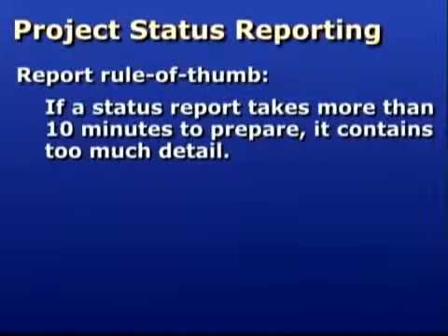Remember, the main purpose of the report is to relate the status of project tasks. Reports do not require a detailed list of all the items each team member worked on. No matter what the size of the project, my rule of thumb is if a status report takes more than 10 minutes to put together, it contains too much detail. Reports can vary from a simple 1-paragraph email to a spreadsheet populated with information from multiple team members. The project manager must clearly communicate his or her expectations for the scope, format, and frequency of reports.